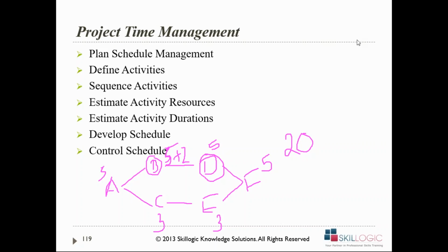So activity B is delaying by 2 days, right? So the question is, what's the question exactly? Yeah. So what I'm saying is, let's say activity A is 5 days, B is 5 days, D is 5 days, and F is 5 days. 5 plus 5 plus 5 plus 5 is 20 days, overall my project length. For some reason, activity B gets delayed by 2 days. So instead of 5 days, activity B gets completed in 7 days.